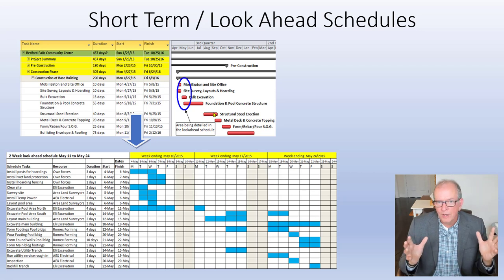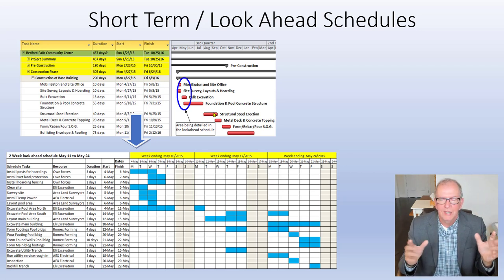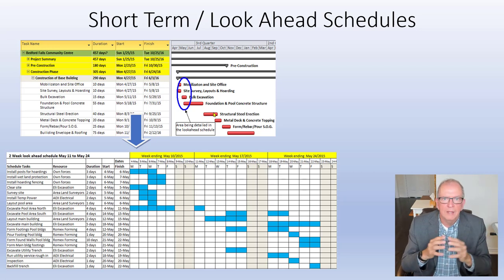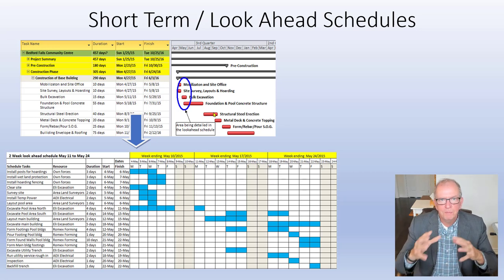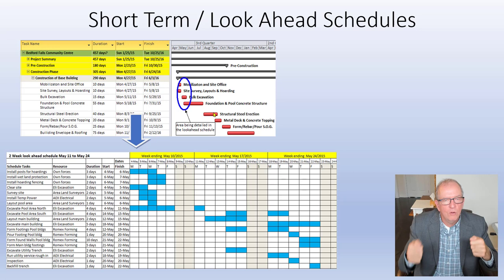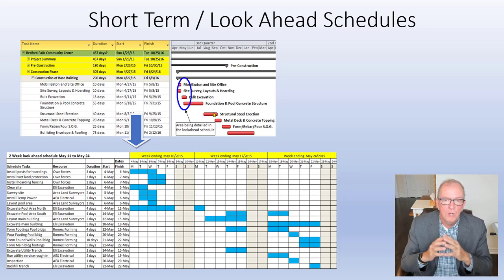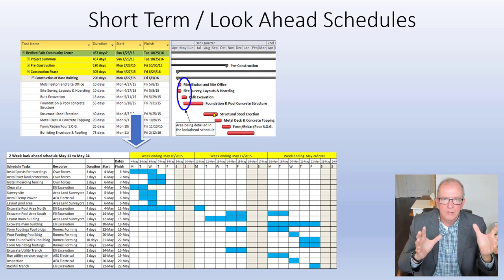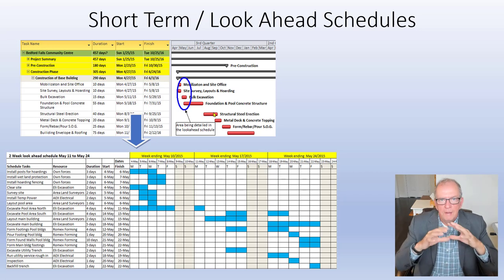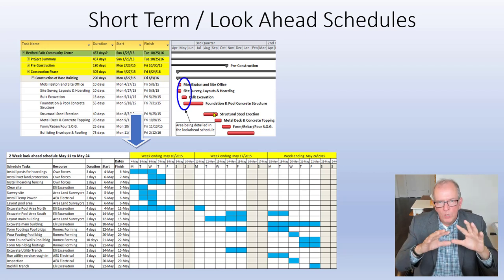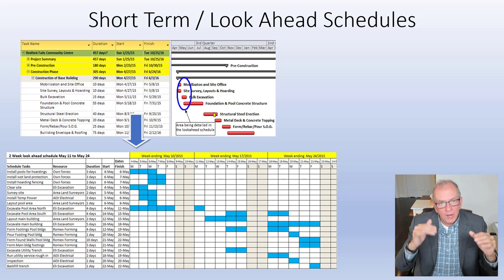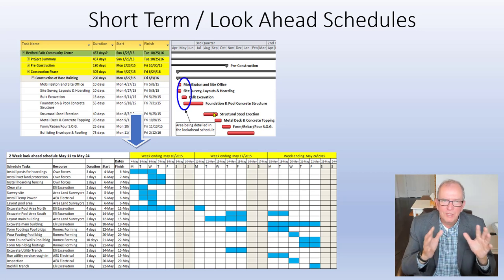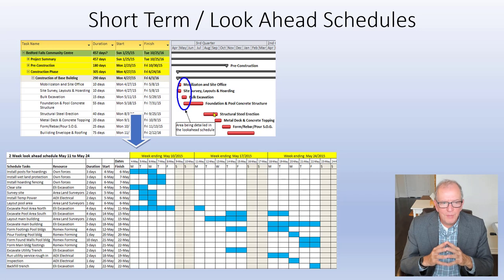It shouldn't be done by a scheduler and one project manager and maybe one site super. You should get key inputs so that it is more realistic. That's one of our failings. Lean kind of pokes at CPM schedules because you didn't really involve the people that are going to be doing the work, so how do you know? You're going to push that schedule on them when they don't think it's realistic and they know more about their specific areas than you. We need to develop a baseline schedule which has had inputs from key players. Higher level, not in the weeds yet, but it should be realistic. We should understand milestone dates.